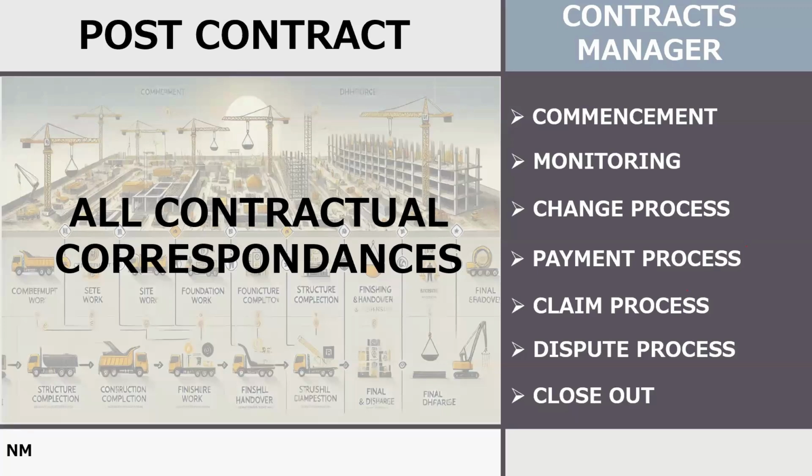So simply, even if he is damaged and even if it costs him a lot of money, if he is unable to put those figures into the document he submits at the taking over of the project, he will lose his entitlement to get the money back. That is how important and effective this practice is under contracts management. So having a qualified, competent contracts manager is very important for all the stakeholders to reserve their rights under the contract.